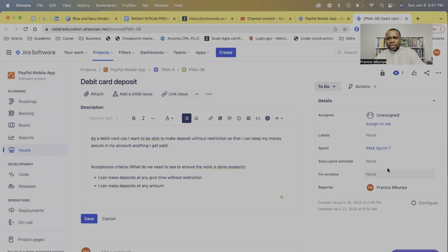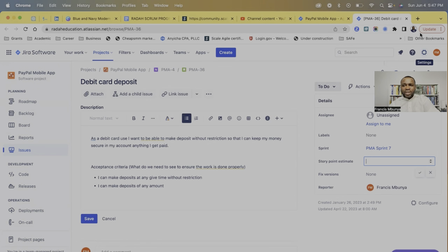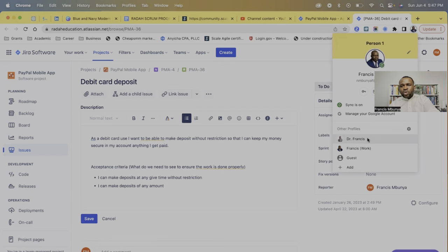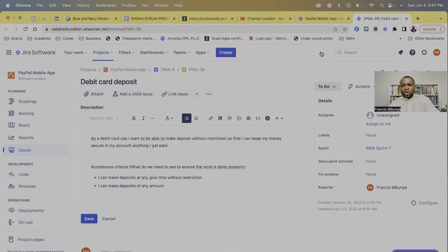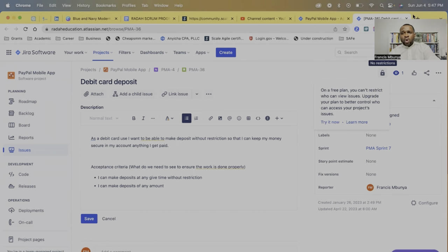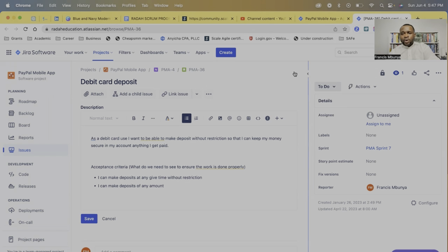At this point, when we're still estimating, we can go ahead and do our story pointing. Now, for story pointing, we use what we call the Fibonacci sequence. And in order to use the Fibonacci sequence, if your team is new, I always advise using the poker planning board. If your team is not new to poker planning, they've been doing this for a while, you just need to say, okay, team, what effort do you think we're going to require? And you ask them to put their comment on the chat, right?